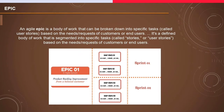When you talk about an epic, it's a summary of the entire requirement. Traditionally we called it requirement gathering; here we call it epic gathering or determining the epics. Epics are a big chunk about a particular functionality — it could be called a feature. This feature will then be broken into simpler forms as stories, and user stories can be further defined into simpler tasks. If user stories are simple enough, they can be taken directly into your sprint. If they have multiple sub-features, you break the user story into tasks before taking them into sprint. It all depends on the organization structure and the process you are following.